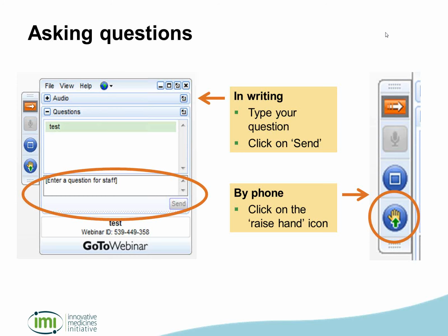Yeah, the main reason for this was that we would want to continue learning by doing, so to speak. We weren't sure what the results will be, what the needs will be in 2 years' time, how the topic will evolve, and we felt that a continually adapted form of the CSA would serve the overall project better than having a fixed structure in place for up to 6 years, which would be much more difficult to adapt in case the needs of the CSA did change.